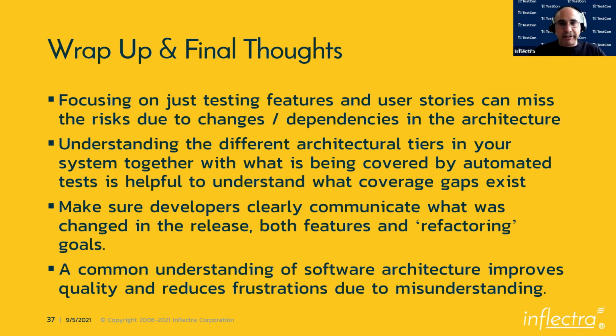Make sure developers, testers, architects, and business analysts communicate what the goals are for this release. Make sure you have common goals. That's the features you're going to release, but also the refactoring goals. In Agile, we should always have refactoring goals and do it every release as much as possible so you don't get technical debt built up. But make sure there's a common understanding of what that refactoring goal is and what the likely impacts and side effects are.